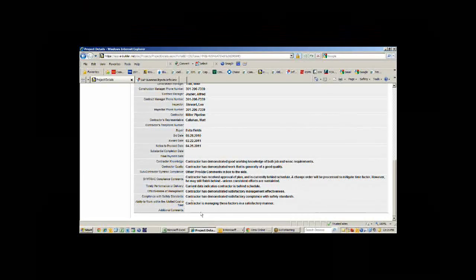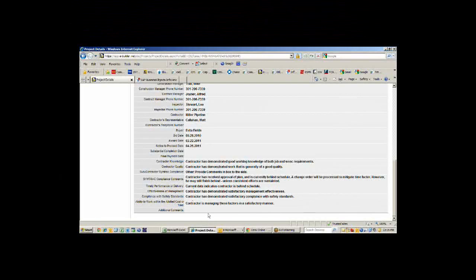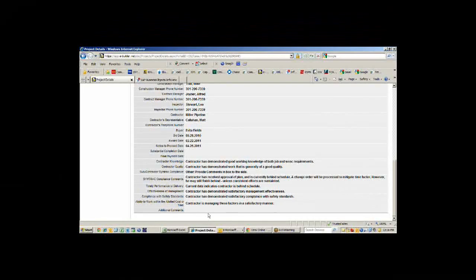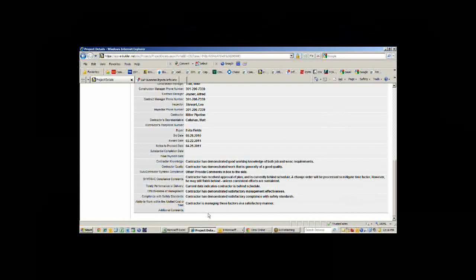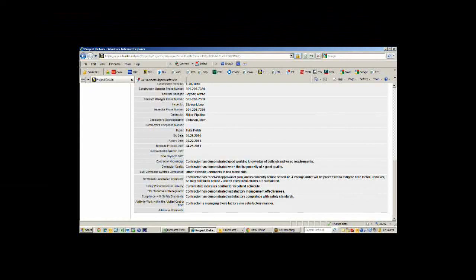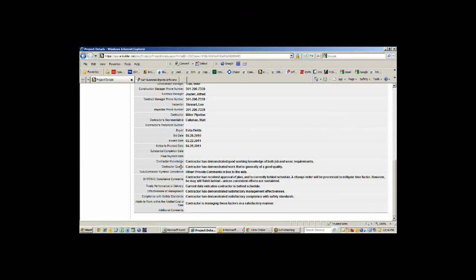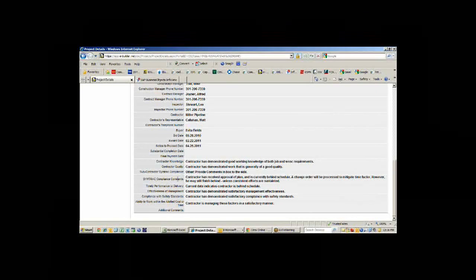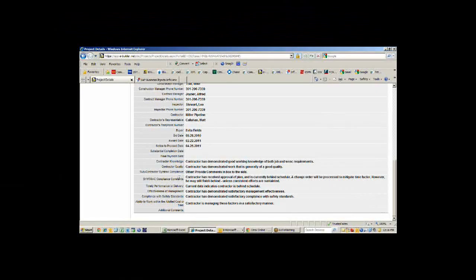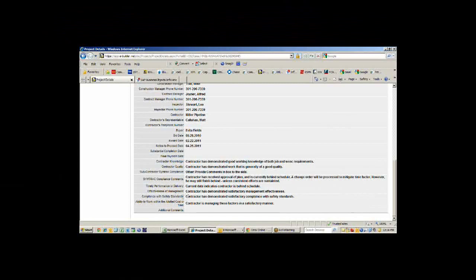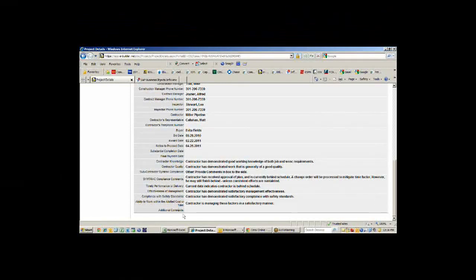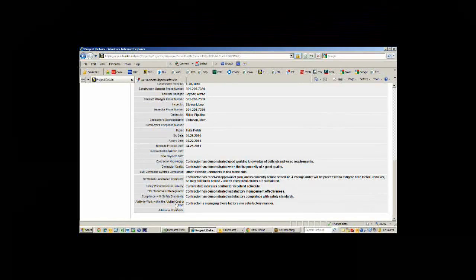Down at the bottom, our acquisition office requires us to do a monthly report that shows the status of different pieces of this project. What knowledge the contractor has, what quality they're generating, compliance with subcontractor reports, delivering product on time, effective management, safety, and ability to finish the project in a satisfactory manner.